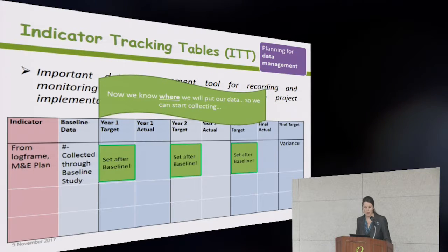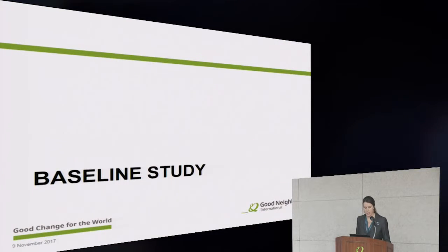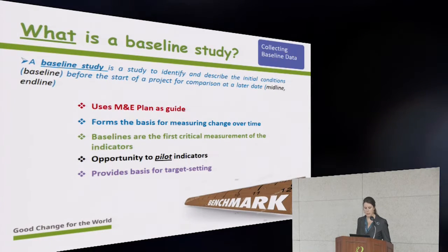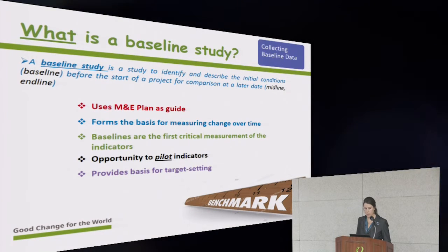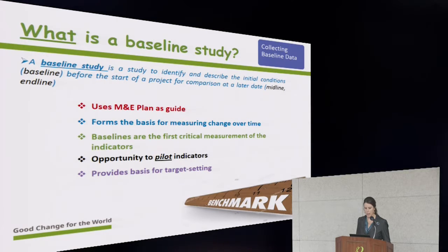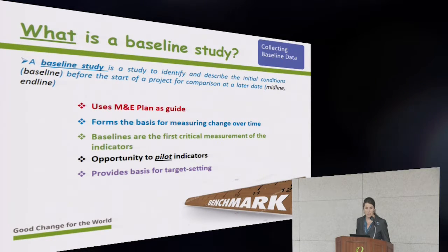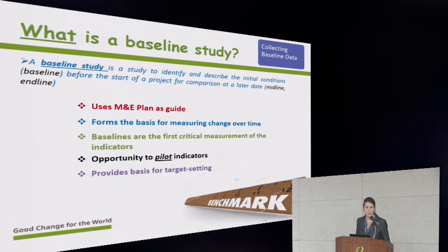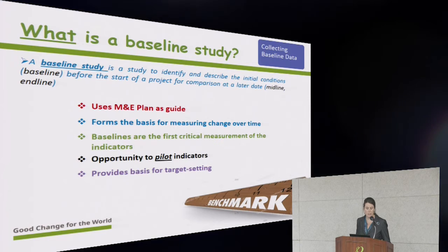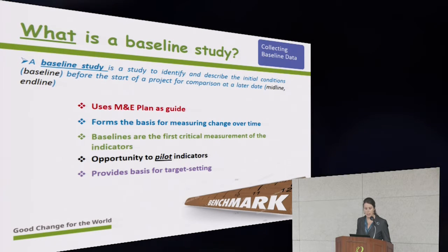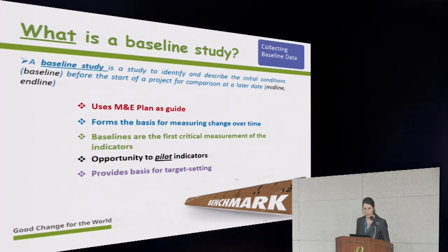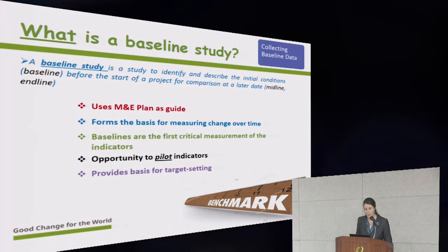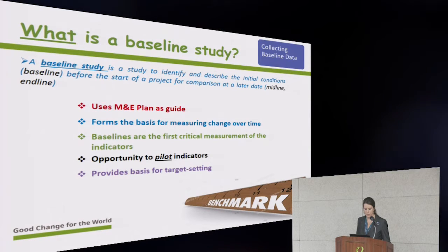So now we know where we'll put our data, so we can actually start collecting our baseline data. And to do this, we'll conduct a baseline study. A baseline study is a study to identify and describe the initial conditions before the start of a project for comparison at a later date, so midline or endline or at whatever point is needed. The baseline study uses that M&E plan that we talked about as a guide for data collection, and it forms the basis for measuring change over time.